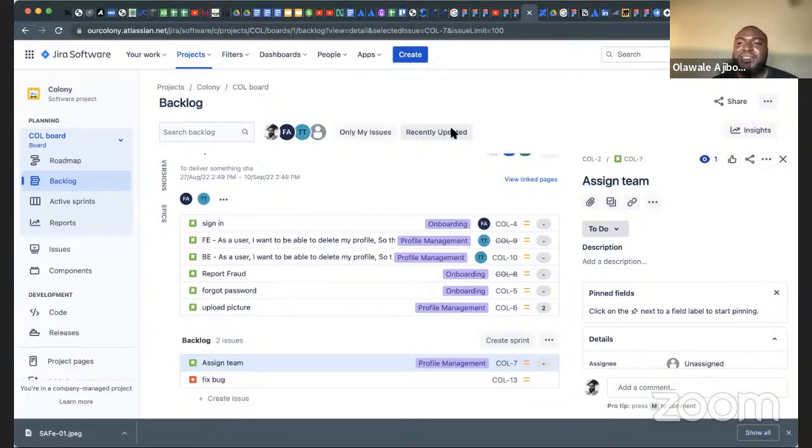From my experience, 9 to 10 people can give their feedback in less than 10 minutes. I'm not even kidding. Each person should talk for less than a minute: what I did yesterday. You can put a timer on your watch. Once you see someone has exceeded the time, you tell them, okay, let's take this out of stand-up.